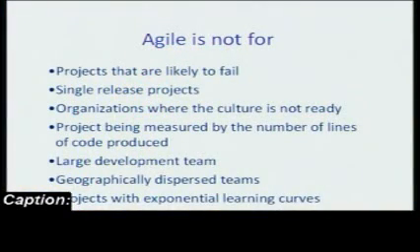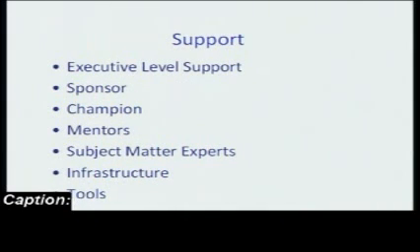With many developers dispersed throughout the world, it's not a good idea to use XP. There are other methodologies that use lean development techniques, but XP is not a good idea. And we mentioned before, if you have an exponential learning curve, you cannot do that. Maybe later on technology will allow us to do pair programming with distributed people in different countries looking at the same monitor side by side. Until then, it's not a good idea to have Agile for developers that are not co-located or where the customer is not co-located.